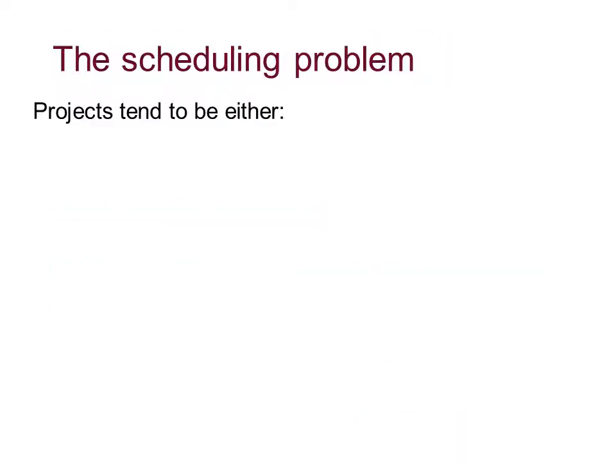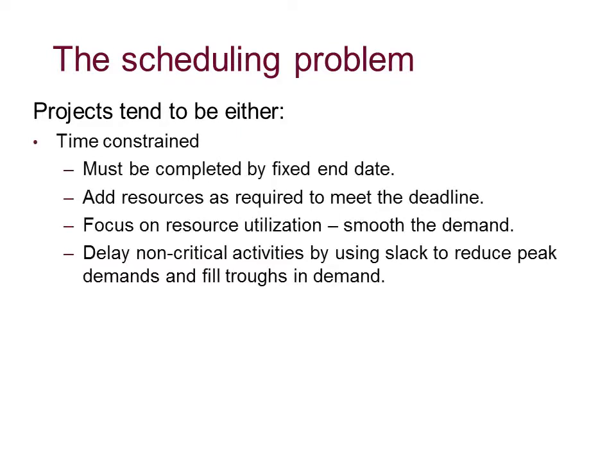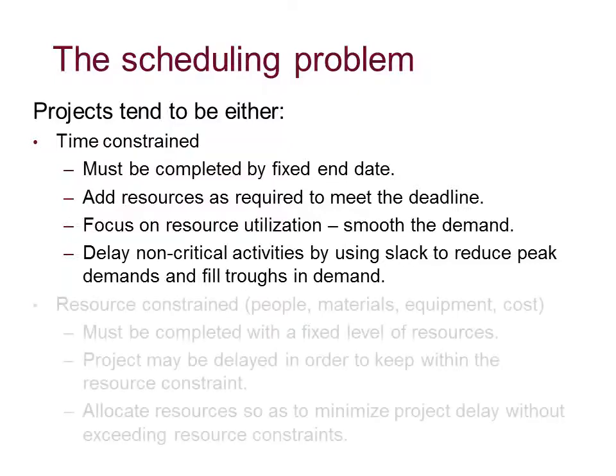So the scheduling problem. Projects tend to be either time constrained, in that they have to be completed by a fixed end date. They add resources as required to meet the deadline. Here they focus on resource utilization. It's about smoothing demand. There might also be an issue around delay of non-critical activities by using slack or float to reduce peak demands and fill troughs in demand.